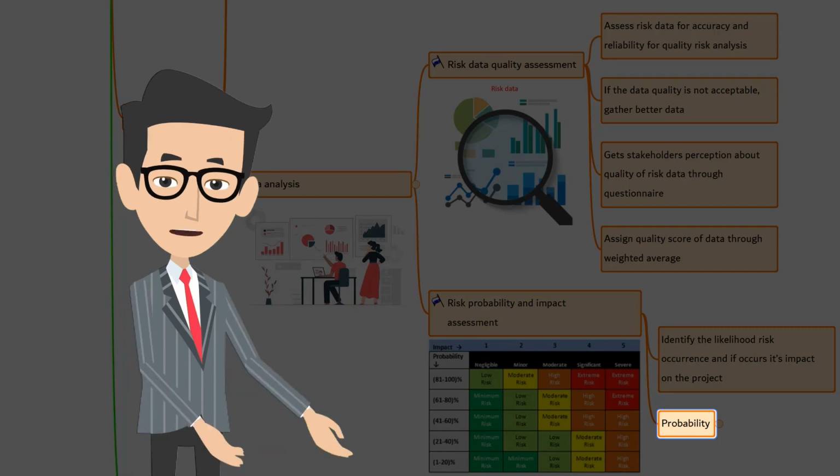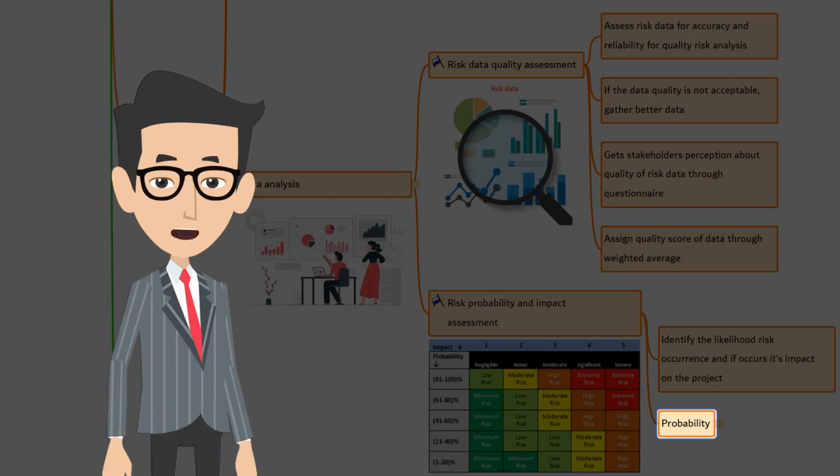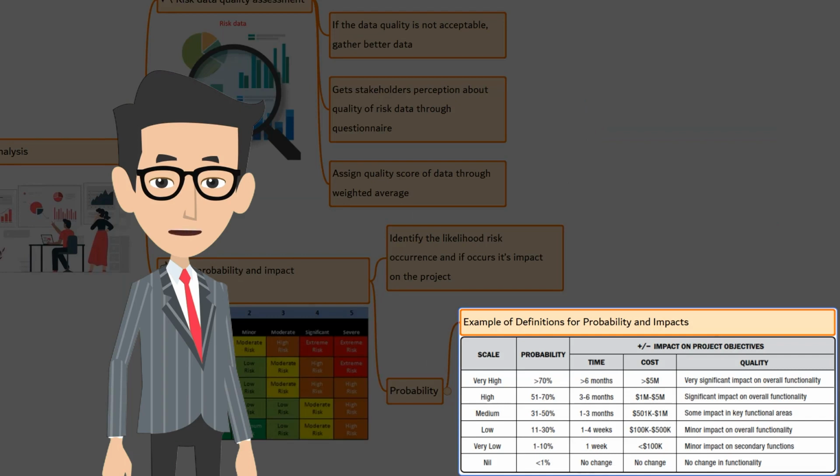The likelihood of a risk occurrence can be assessed by interview or meeting with the project stakeholders. Based on their familiarity, knowledge, and past experience, they can shoot out a number on the probability. For this meeting or interview, project team members and knowledgeable persons external to the project can also be included. As a project manager, you can find a way to arrive at a final number such as averaging or weighted averaging method, etc. Let's go back to the table.